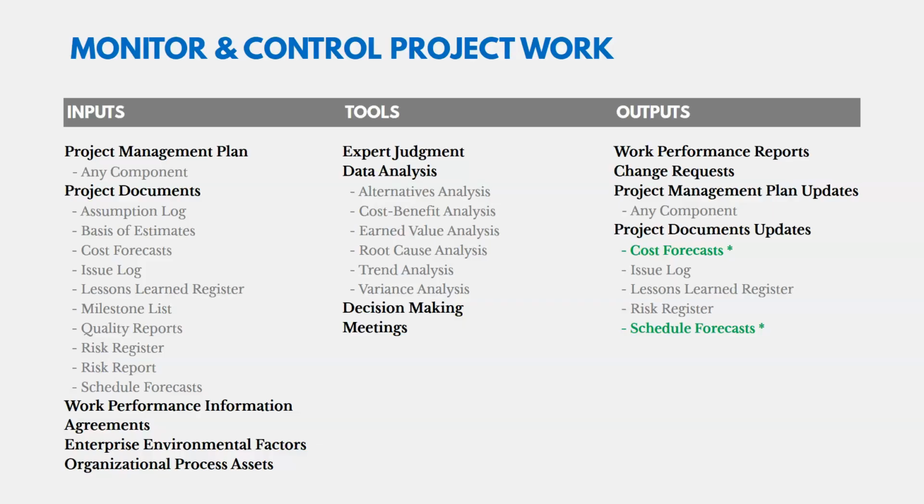Now, other things I want to mention here too is that the outputs of this are going to be work performance reports and change requests. So we're taking that information you see as an input, work performance information, and turning it into a report. We're going to share that with our stakeholders or appropriate stakeholders. And we may also have change requests as an output.